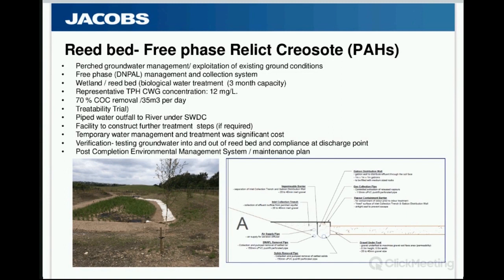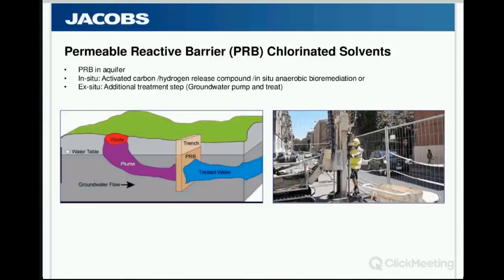This isn't a zero cost option, because for the duration of the NAPL discharge there will be an environmental management system and a maintenance plan in place where the free product is removed and the reeds and all the pipe work need to be maintained. However, from a cost benefit and sustainability perspective, this was definitely the preferred approach, and it was signed off by the Environment Agency and the local planning authority.